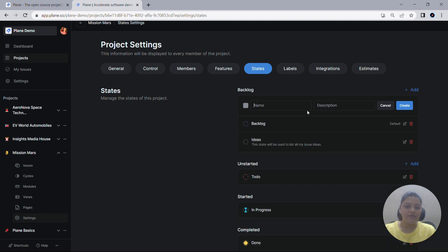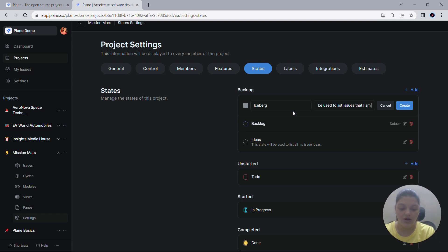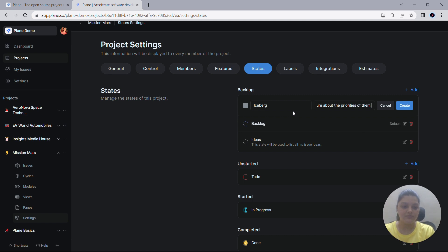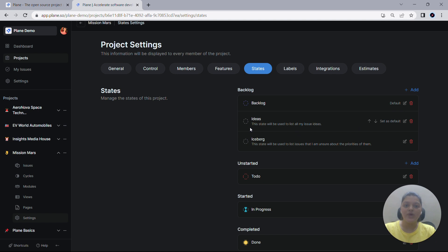Let me create one more state with the name Iceberg. Let me give it a description as this state will be used to list issues that I am unsure about the priorities of them, and create it. With these two additional states in the Backlog group, I can better organize and manage my backlog effectively.